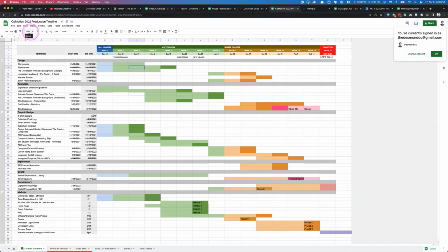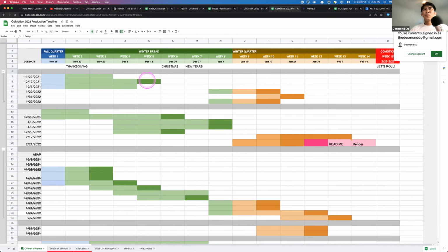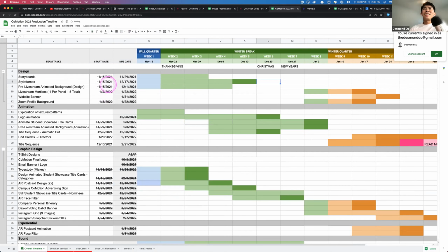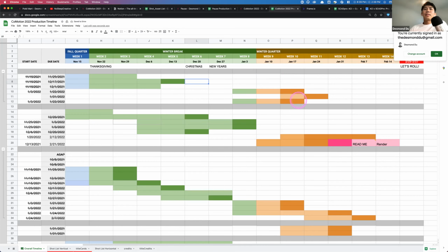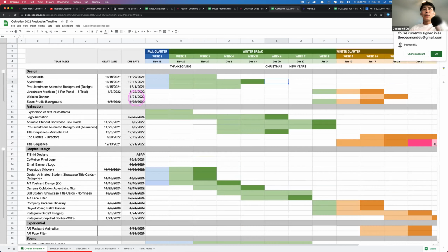Okay, so just to walk you through what this Gantt chart consists of. Usually on the left-hand side, we have the things we need to do. It helps to separate them into the big tasks, design, and the subtasks in between. When's the start date, when's the end date, and then you visualize it. Okay, so this is a very manual process, because you will copy this and then paste it in to color it. It's not very interactive. It's not like you change the date and then this will update, but it's good practice. It's like you start at level 0, you're not given the tools, so you build everything on your own. So when you use an actual digital tool to do this, you know what to look for.